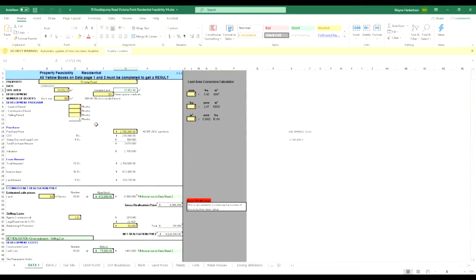So then what we do is we try and get our option, and the option period we've got on this particular block is 24 months. And we believe by giving us 24 months, that reduces the interest requirements for us to hold the land and pay the full price for the land. So it means this development program begins after the DA starts.